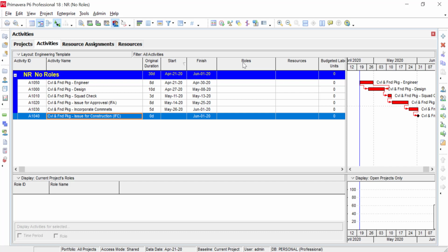In this particular case, and in the next video that I'm going to show, we're going to flip-flop the resource and roles. I will build my craft at the resource and my company at the role. So now when I copy templates, it gives me the ability to level on the craft here, and the company will come in later. So it's just flip-flopping that, and I'll do it in my next video.